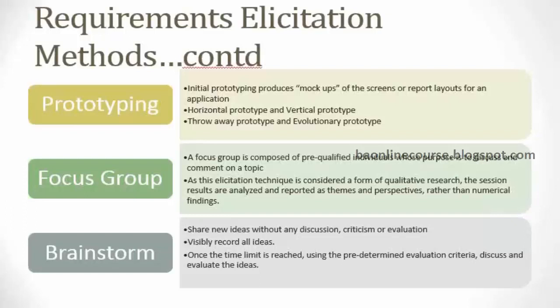Now for that, broadly list down your SOW, right? So let's say these are the 4 things that I want to do in a hospital management system. I want to register a new doctor, register a new patient, I want to create an appointment, and I want to make the payment, right? So 4 different SOW, and then think through each one of those features. Like when I'm doing a doctor registration, what all details do I need to ask about the doctor registration process, and what all it would include. What all techniques can I use? It will help you put your thoughts in a more structured way, right?